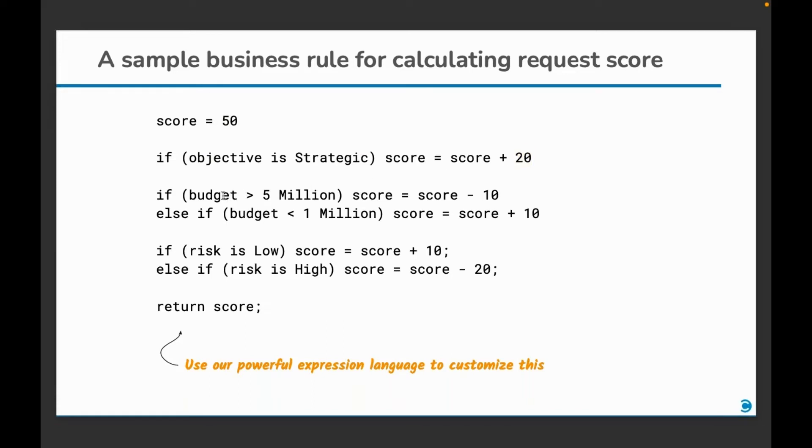Next is the budget. If the budget is more than 5 million, then we deduct 10 points from the score because we want to discourage high budget projects. However, if the budget is less than 1 million, we add 10.